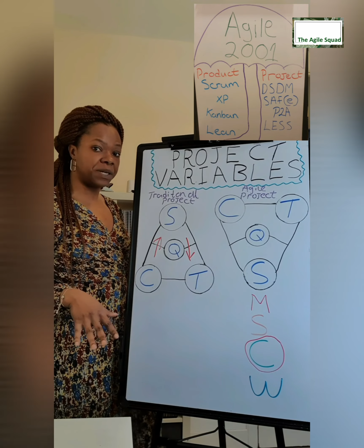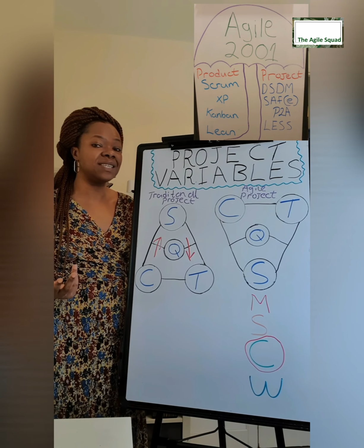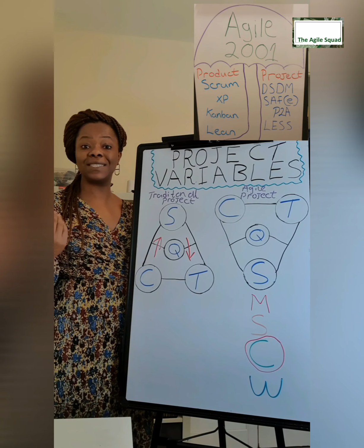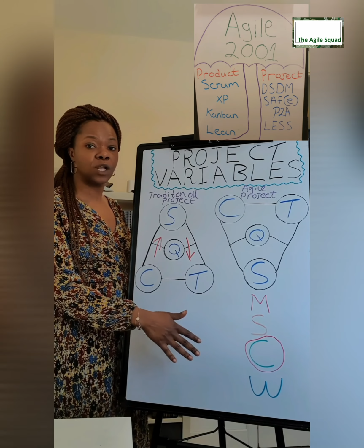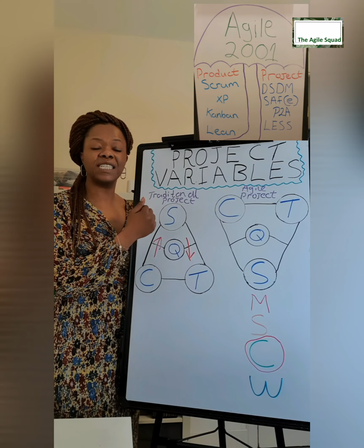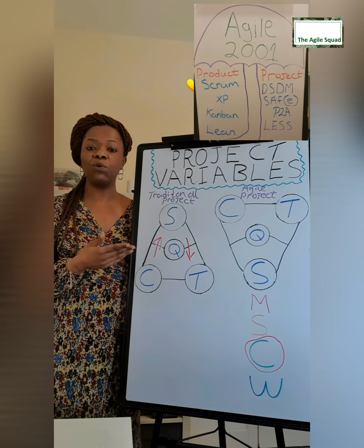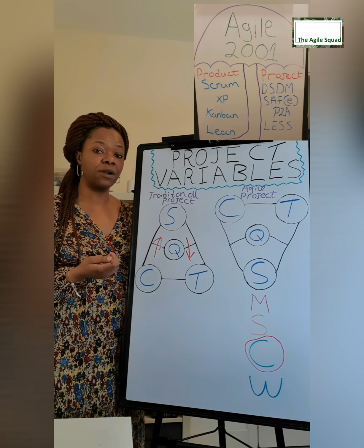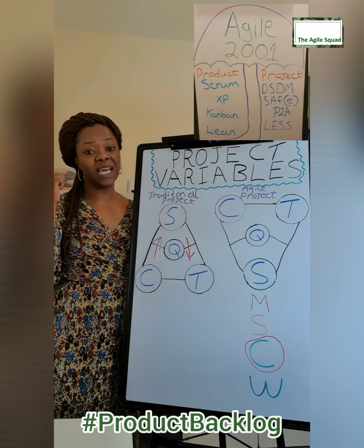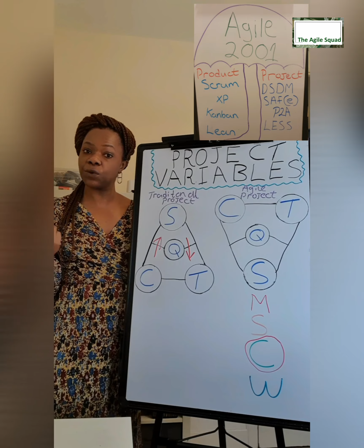Those things that you're de-scoping, that you're dropping, where are they going to? You still have to get them done because this is still a requirement that a shareholder, stakeholder, owner, manager, someone senior may have asked for and they still require, but it's just not important right now, but they want it. The product development team, so let's use Scrum. The Scrum team picks it up. So Scrum, they will have their own list of things to do called a product backlog. They will then put this requirement that we have dropped onto their list of things to do and reprioritize it. Is it a must have for them, could have, should have, and so on and so forth.